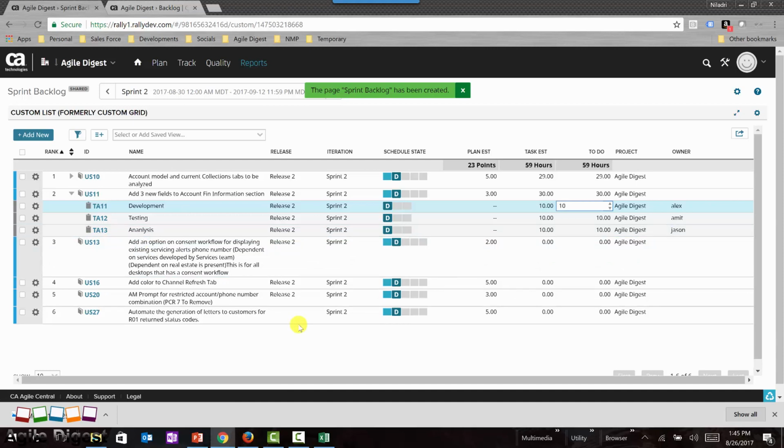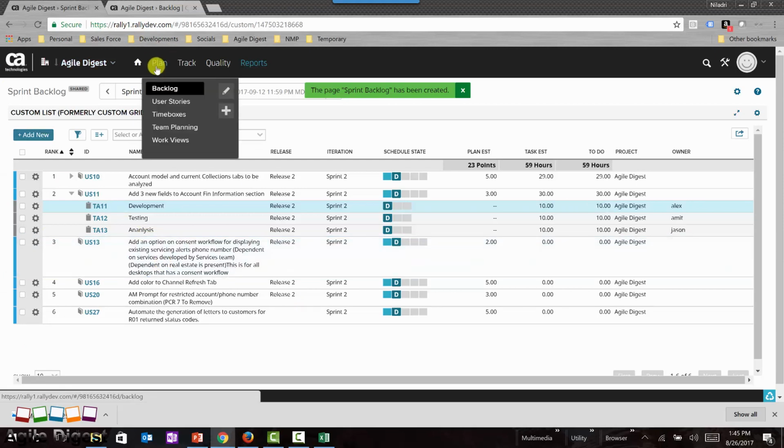So you remember we talked about there are two outcomes from our sprint planning. One is the sprint backlog, and the other one is the sprint goal. Each and every sprint is to have a sprint goal, and that is the first. When you do sprint planning, the first half is defining the sprint goal. Once you have decided, that's a negotiation the team does with the product owner and finalizes: okay, for this particular sprint this is our goal.